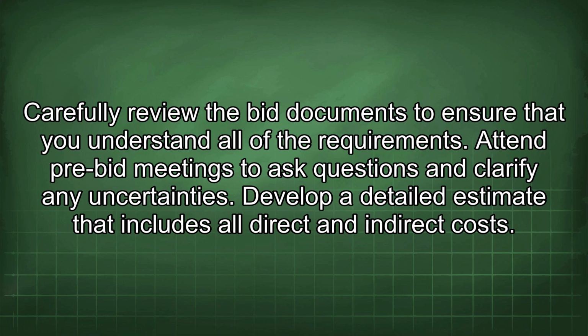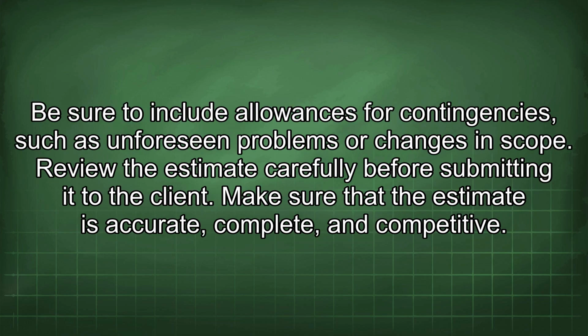Develop a detailed estimate that includes all direct and indirect costs. Be sure to include allowances for contingencies, such as unforeseen problems or changes in scope. Review the estimate carefully before submitting it to the client. Make sure that the estimate is accurate, complete, and competitive.